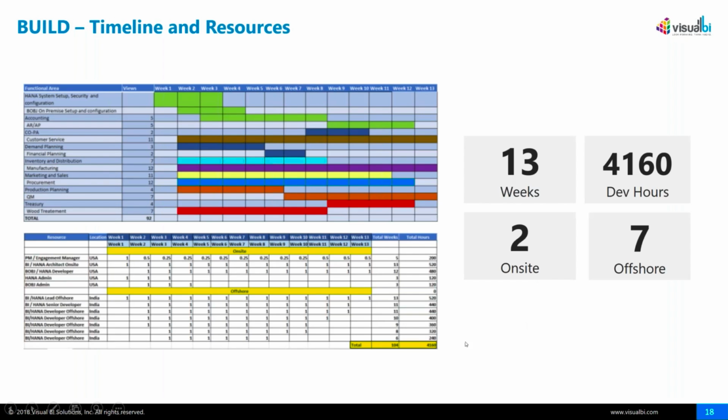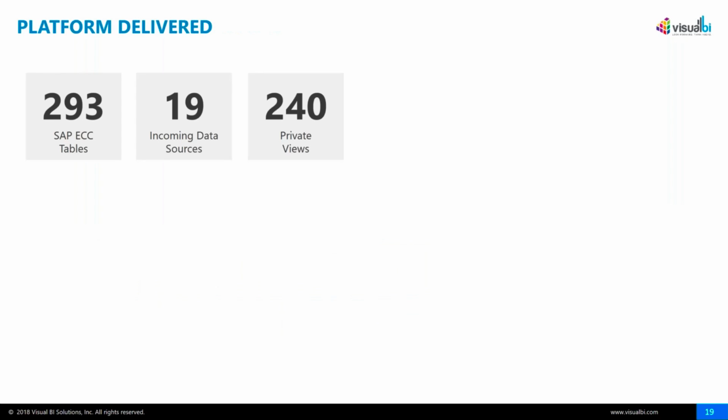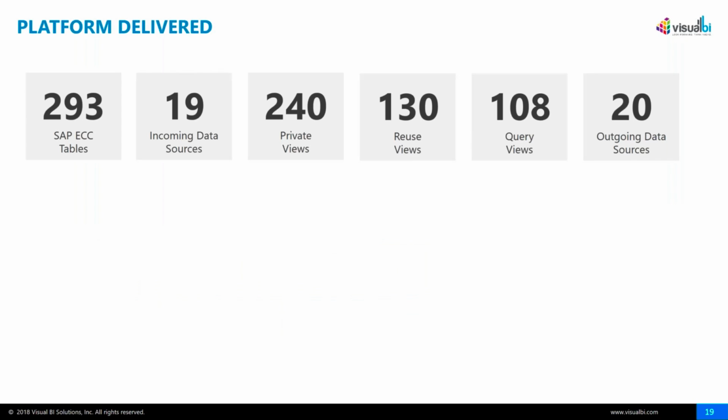So it was 13 weeks, 2 on-site, 7 offshore, and roughly 4,000 development hours. Again, a very aggressive timeline, and we went live on time as we anticipated. Any delays were really due to us and our testing, and they were fantastic in delivering daily and weekly what was expected.